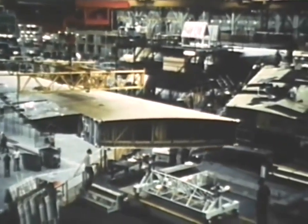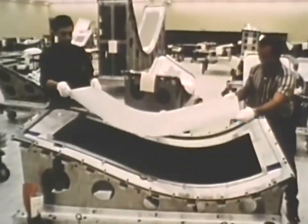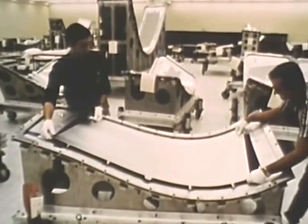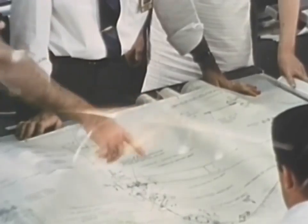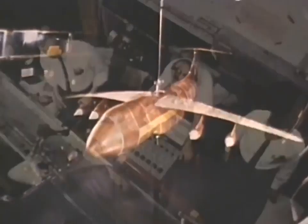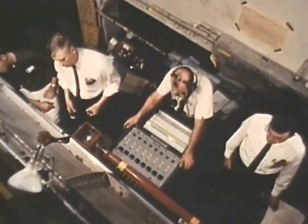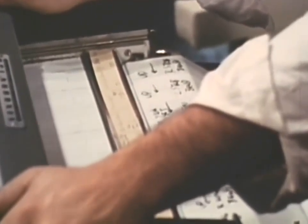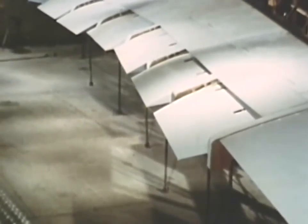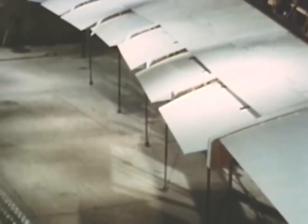The Avco outer wing sections must mate exactly with wing tips, leading edges, and ailerons manufactured by Canadair Limited in Montreal. We're doing nicely, but I must admit it's only due to the extreme cooperation of everyone. You see, we started out with a high lift system. Then, rather late in the game, but as a result of continuing wind tunnel testing, Lockheed engineers found they were becoming critical on the three-engine climb out. They wanted to trade off some lift capability for some freedom from drag to improve that climb rate. So they shifted to a Fowler flap system, which also changed the slat design.